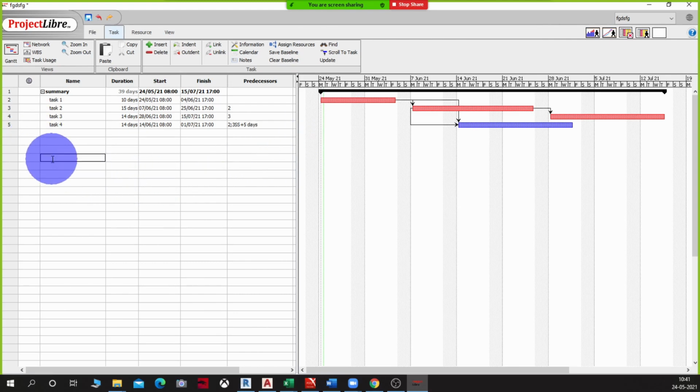You remember? We had taken those 3-4 different types of tasks. All have been assigned 10 days, but depending on the calendar which that follows, it might finish in 5 days, it might finish in 15 days, it might take 20 days. So if you would have done any customized calendar, unknowingly would have assigned that calendar, then it would become a wrong entry, or it would show the entry according to that calendar.